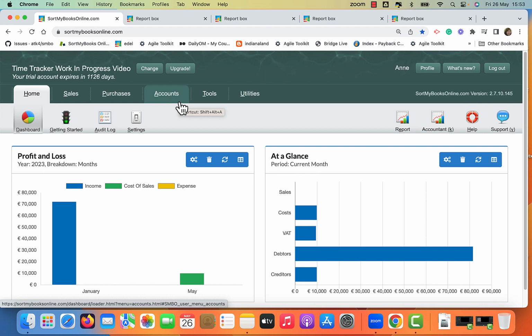The amount you pay your employees is not really what they cost. If you think in terms of an hourly rate, you are paying your employees for every hour. So you're paying them for 52 weeks a year, but they don't work 52 weeks a year. They have 10 days public holidays and they have at least 4 weeks annual leave.